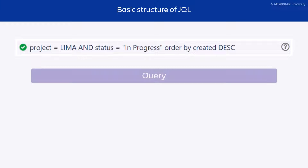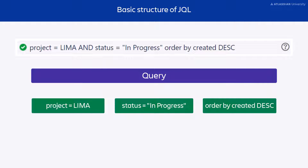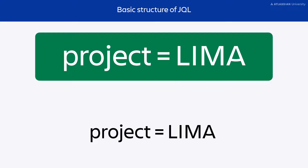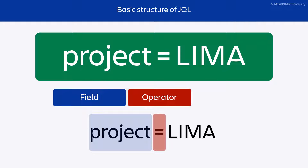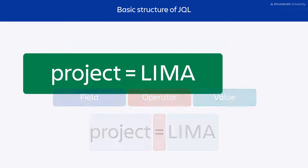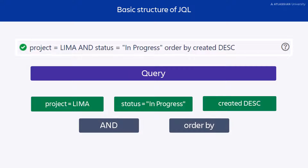This entire statement is called a query. A query is made up of multiple clauses, and these clauses define the issues you're searching for. Each clause is made up of multiple elements: a field — in this example, the field is Project; an operator — in this example, the operator is the equal sign; and a value — in this example, the value is Lima. In order to complete your Jira query, you must connect each of your clauses with keywords, such as AND and ORDER BY.